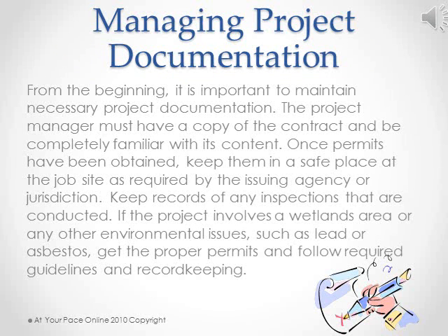Managing project documentation. From the beginning, it's important to maintain necessary project documentation. The project manager must have a copy of the contract and be completely familiar with its content. Once permits have been obtained, keep them in a safe place at the job site as required by the issuing agency or jurisdiction. Keep records of any inspections that are conducted. If the project involves a wetlands area or any other environmental issue, such as lead or asbestos, get the proper permits and follow required guidelines and record keeping.